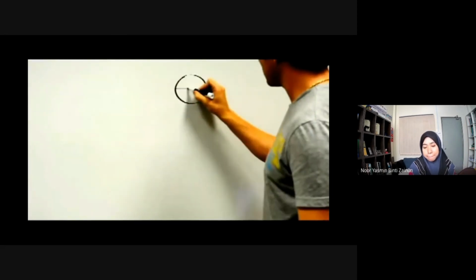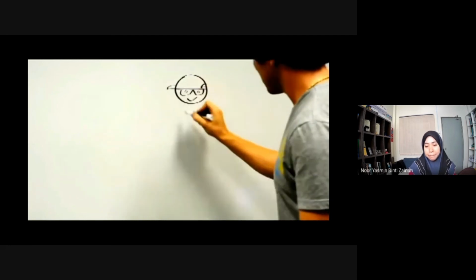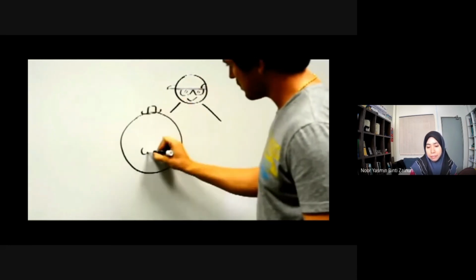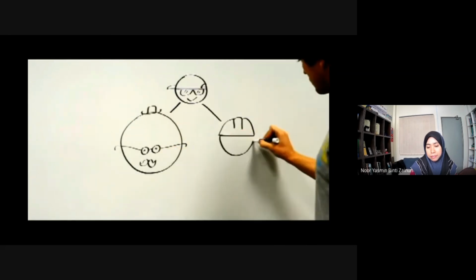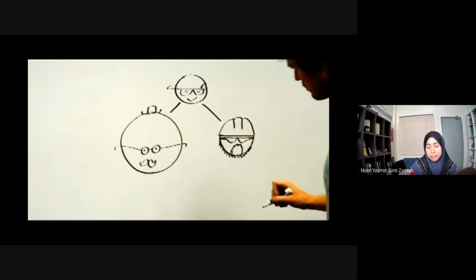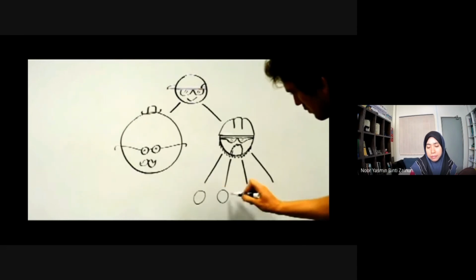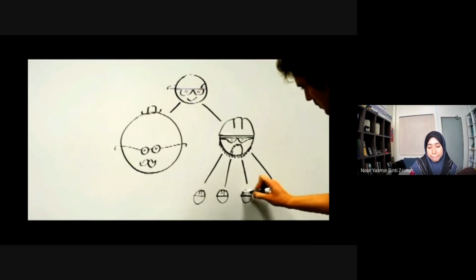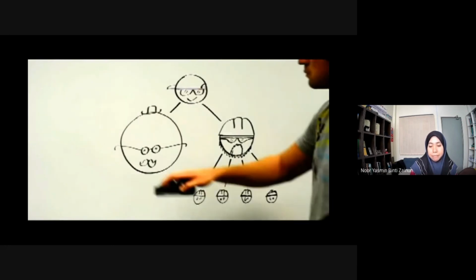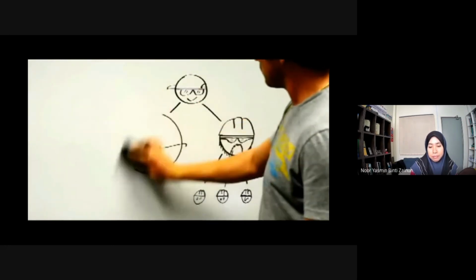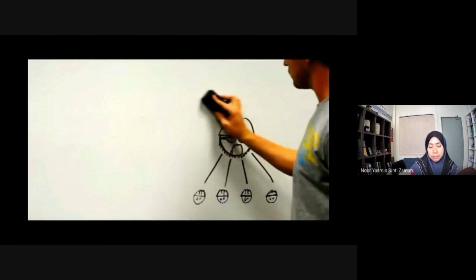It is a method in which the owner forms a separate contract with each of the parties involved, the design party and the construction party. In most projects, each of them can also form contracts with consultants in the case of the architect or subcontractors in the case of the general contractor. The traditional method differs from other project delivery methods in its 3 distinct and most importantly, linear phases: design, bidding,